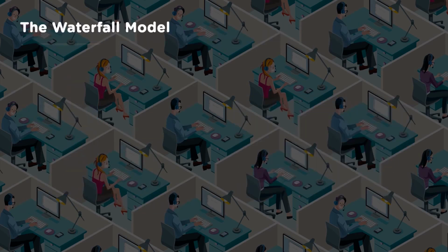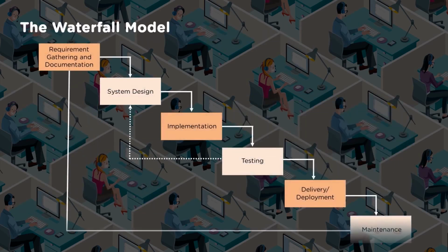Now, what is the methodology, what is the flow in the waterfall model? We need to understand that. Requirements gathering and documentation is the first thing that used to happen, which is true in agile methodologies also. But the main difference here is that requirements gathering and documentation happens in detail, a comprehensive one. Once that is signed off, only then is it moved to design. Based on the requirements gathered, which are full and comprehensive, the design will happen, considering the process, the products, the people, and the environment. Then the design happens, which is again a detailed design.